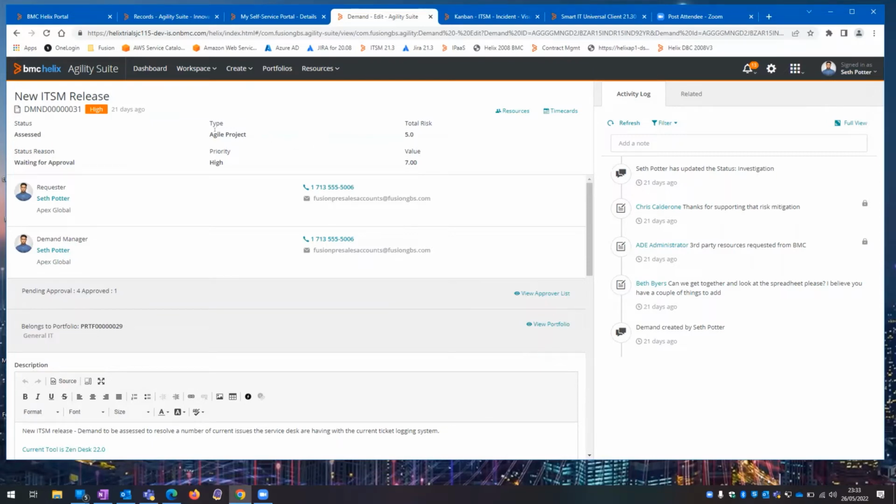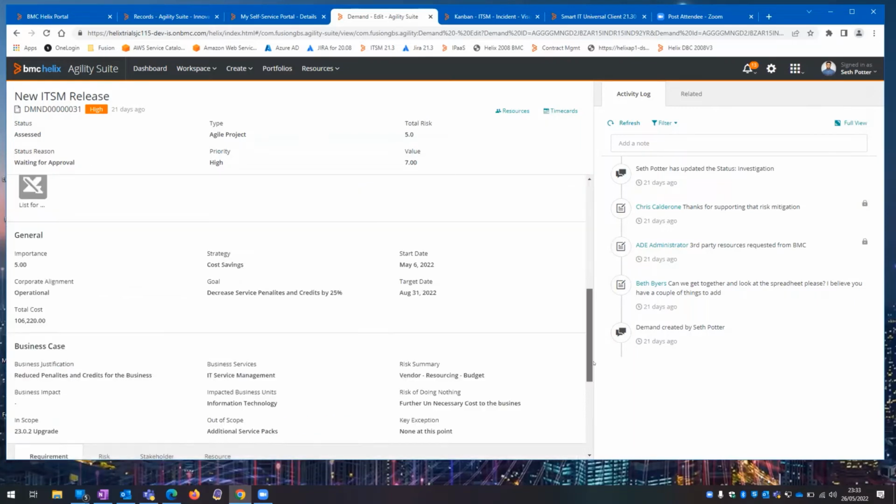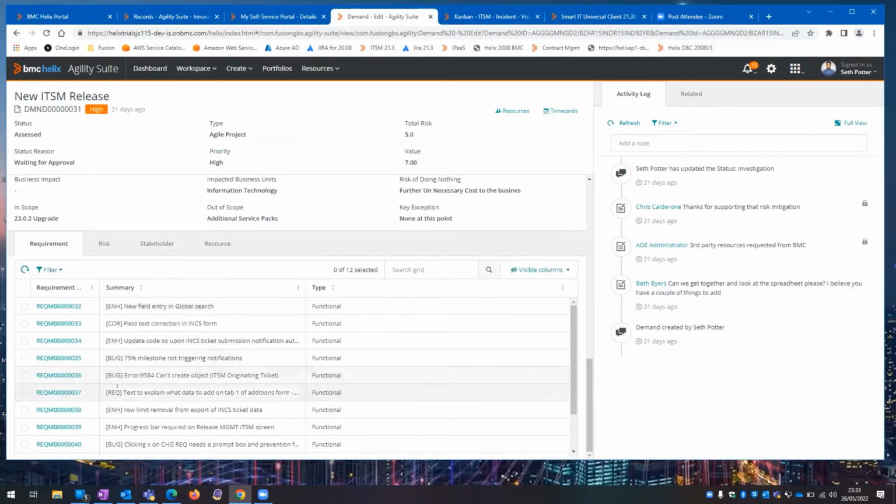We've made a decision that if we approve this, because it's underway approval, we can turn this automatically into an agile project. What does that mean? Well, what it means is underneath here, where you've got all your different requirements, we've got enhancements, bugs and corrections, etc. Those will automatically create upon approval tasks for each one of these that get popped into the backlog. That means that the project managers don't have to concentrate on administration and creation of projects, because there's templates and it's automatically creating these.